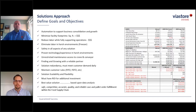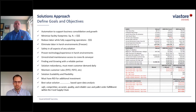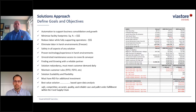The first step in the process is to understand the current operation. Key steps like walking through the customer's facility or discussing a drawing of the current operation can provide a good picture of what's going on within the facility. We want to discuss the goals of the project as well, including changes to the process flow, growth in business, labor savings, and current pain points. It's also important early on to understand any limitations such as labor restrictions, hours of operations, and the space available.